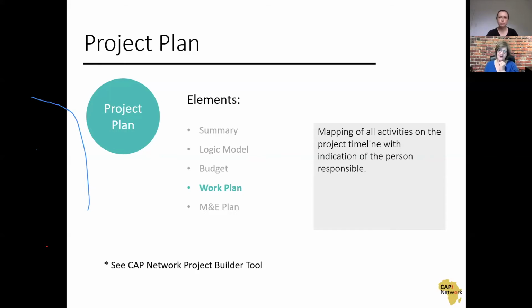One thing, just as a note on that to keep in mind as you're building projects, is that when a funder says that they will fund a project for 12 months, they don't really mean it's a 12-month project. They mean you can only spend their money during that 12-month period.